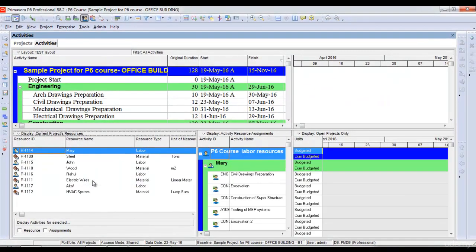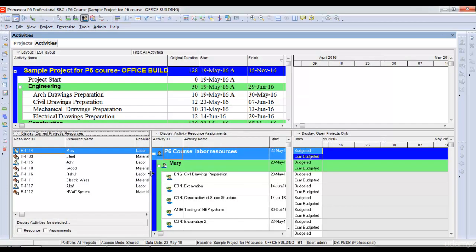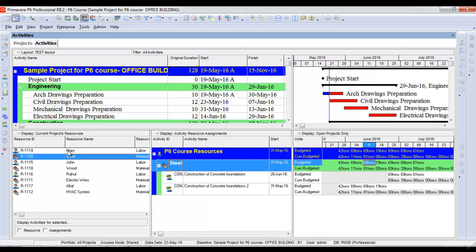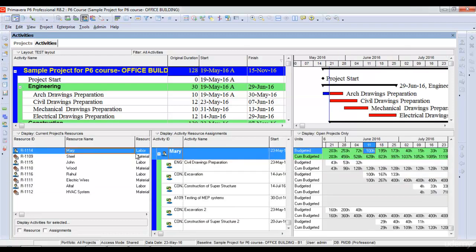Once I filter the resources of this project only, it gives me the list of all the resources that are assigned to this project. I can see their assignments, monthly or weekly assignments. So if I select Mary here in the first section, in the second section it shows me all the activities to which Mary is assigned.